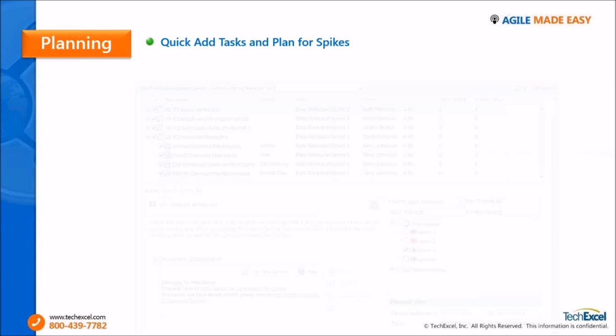So we decided that 2-week sprints are optimum, because within 1 week our developers could implement the feature, and the next week we could use for regression testing and bug fixing, so that at the end of 2 weeks, even if we are implementing a smaller piece, it contributes to the larger product and is a complete feature in itself.